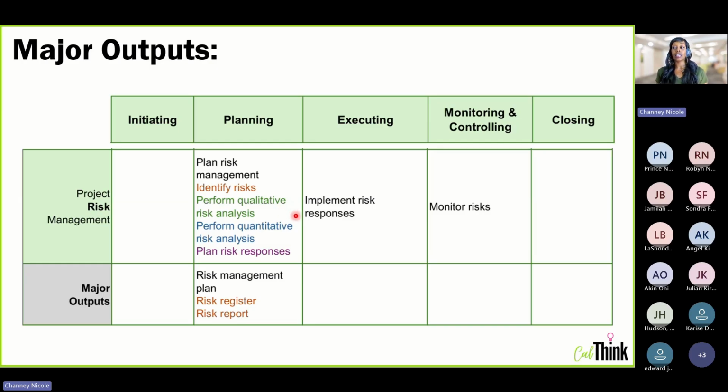I had another client that used the phrase quality over quantity to memorize which one comes first and which one comes second. That also works. But just know that if you get a question about the team just finished ranking risks from highest to lowest probability, what should they do next? Well, they just finished qualifying all of the risks, and now they need to quantify them or go ahead and plan the risk response. Okay, any process that comes after qualitative risk analysis would be the correct answer if you're following the flow of processes.